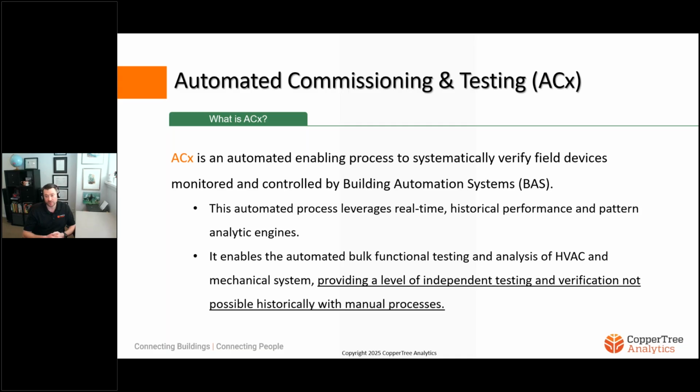However, we are doing commissioning projects where all we are doing is ACX. There is no fault detection diagnostics present on the site. That is typical of new construction facilities, for instance, where we are being deployed for a very short period of time in the beginning to enable the functional testing and commissioning of equipment, usually pre-formal commissioning. So we're making sure that everything is ready.